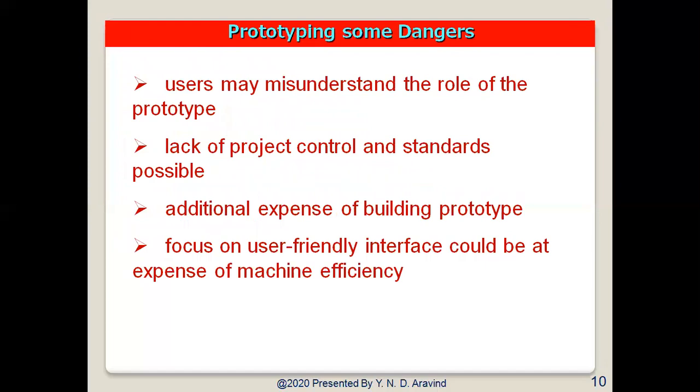So here, as we have said, the prototype has so many dangers and some weaknesses. Here, the users may misunderstand the role of the prototype, or a lack of project control or standards is possible. There are also additional expenses for building the prototype. So at the initial stages, before the construction of the project itself, we need to make a certain investment. We need to spend some time when we make the prototype.